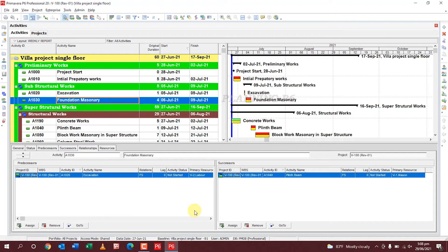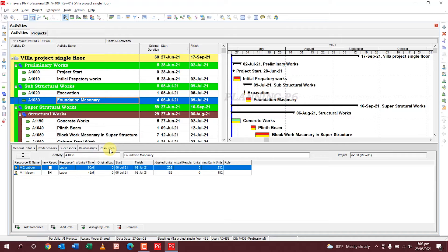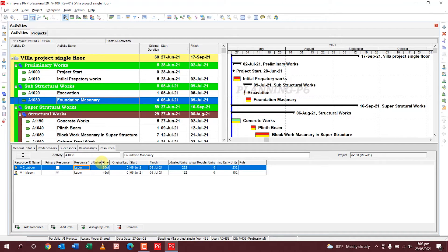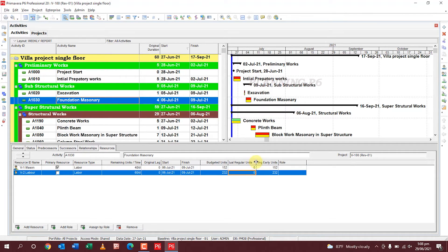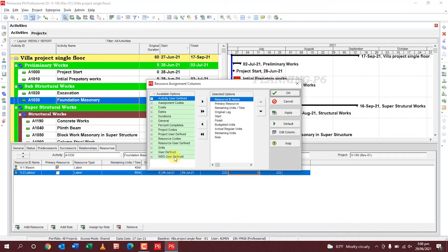In the Resources tab, you can add a resource, add a role, assign by role, and remove resources from here. You can see the primary resource, resource type, resource units, remaining units, original lag, start date, finish date, and selected units — all of which can be changed from here. You can also customize the resource columns the same way.